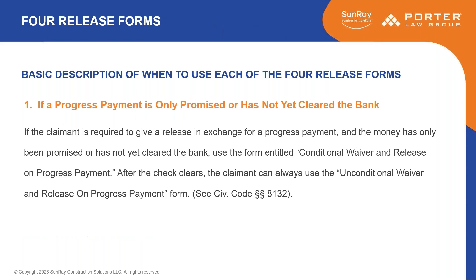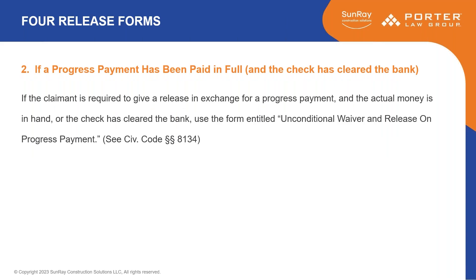Here's a basic description of when to use each of the four release forms. If it's a progress payment promised but the check hasn't cleared the bank, then you would use the form called 'Conditional Waiver and Release on Progress Payment.' After the check clears, you can then use the 'Unconditional Waiver and Release on Progress Payment,' found in Civil Code section 8132. Then if a progress payment has been paid in full and the check has cleared the bank, you'll use the unconditional waiver on progress payment, described in Civil Code section 8134.